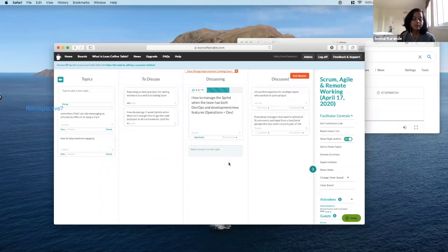My team wasn't set up that way, but before I was a Scrum Master, I was a QA on a team that handled a lot of production issues. Our Scrum Master and we came up with the idea to set up some points in the sprint specifically for the production issues, around 5 or 8, and include that in the sprint planning.